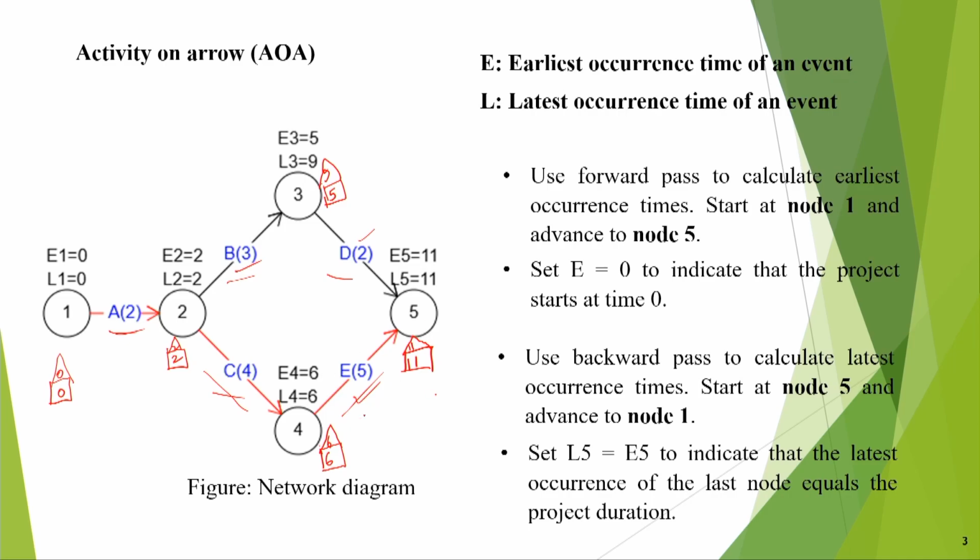So here if you see that condition, whether E is a critical activity, yes, because it has to finish at 11, earliest and latest, both are the same. This is 6 and 6 plus 5 is 11. So therefore E is critical. Similarly C, 6 and this is 2, this is also critical. C is critical. 2 is also critical because 2, 0, and it takes 2 time. Therefore this is the critical path. So what is the critical path? I am indicating this path is critical. Okay, so that means ACE is a critical path.